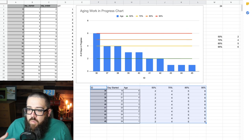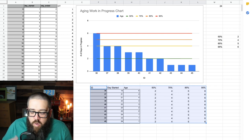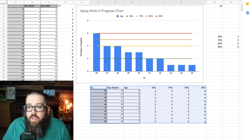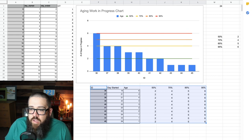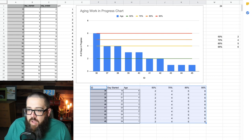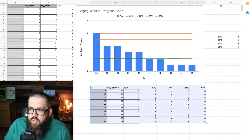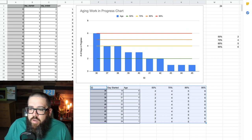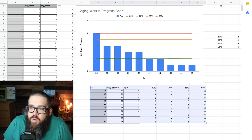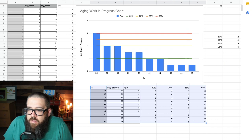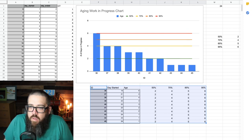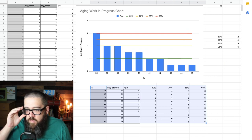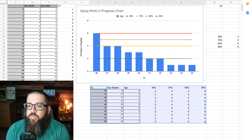So, aging chart. All I did to build this is capture the day that the item started, and then do some little bit of math here in Excel. Actually, this is Google Sheets, but same thing. Excel, Google Sheets. And plot, on a bar graph, the height being how old it is. Then, if I want to take it a step further, and I want to see those percentiles, then what I got to do is grab the 50th, 70th, 85th, and 95th.